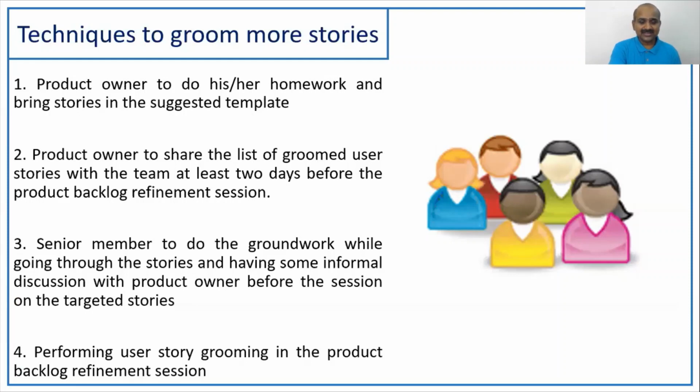Now, the best way, my friend, to groom many stories, many stories means 6 stories, 7 stories in a 3-hour long product backlog grooming session, is, first of all, the product owner needs to do his or her homework, and they need to bring in the stories in the suggested template. Let's assume that the product backlog grooming session is scheduled to happen 2 days from now or 3 days from now. The product owner will share the list of stories along with the details, saying that these are the stories we are targeting to groom in the upcoming product backlog refinement session.